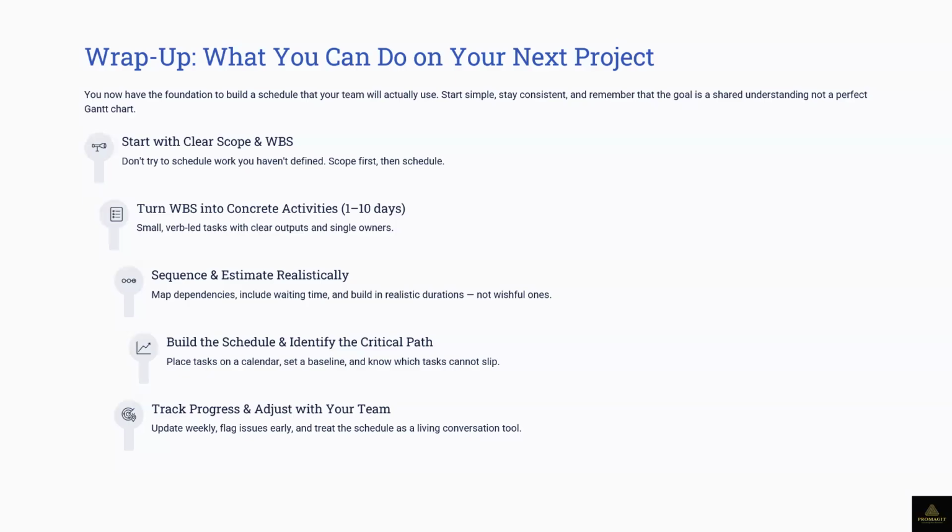But now with what Trump has done, no matter the kind of contingencies, nobody built for what Trump has done. You don't build that into your project. It never worked. 100% increase, you can't build 100% contingency into your project. Nobody does that. It's usually between 10% and 20%. So with what Trump has done, what do you think is going to happen to your project? Fuel is supposed to be $2 million. Automatically, it has now jumped to $4 million or $5 million.